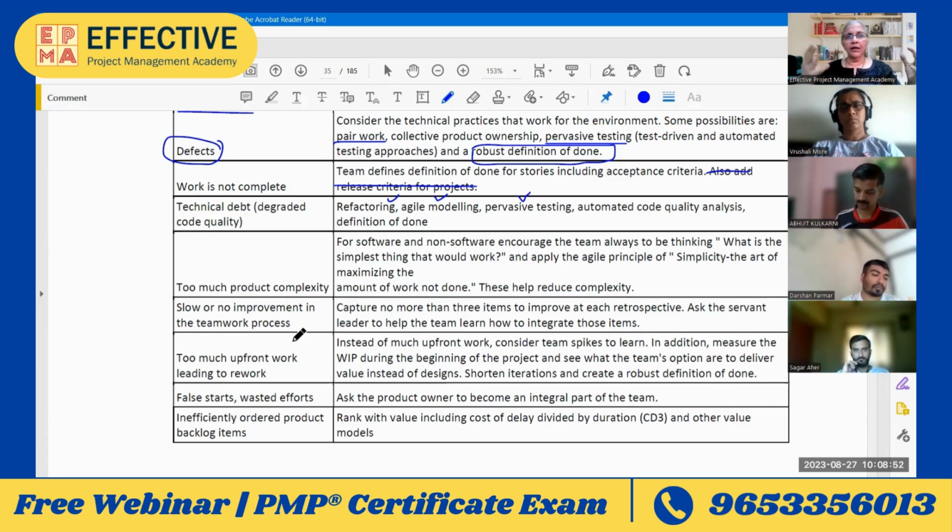So at the end, see, retrospective is a 3-hour event which happens on the last day. You can think of having one retrospective at first weekend, maybe 1 hour, 1.5 hour. 1 hour is also okay. What will they do? They will find out what did not go well. They can start improving there itself. They don't have to wait for the upcoming iteration. But you have to ensure that the time box is not exceeded. Otherwise, look at the team's calendar and they should have that 1.5 hour to spare. That's what you have to think about.